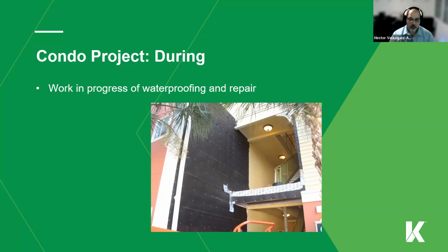In this case, it went from one corner to the other, where we had a typical joint on the building, and that's what it looks like in that picture. But they did the whole wall. We fixed everything that needs to be fixed, and that is a more permanent repair than just a Band-Aid to address the beam and forget about everything else. Well, other areas are affected. Not only that, if you do minimum repairs, you're going to have patches. People don't like patches. So going from wall to wall is a lot easier.